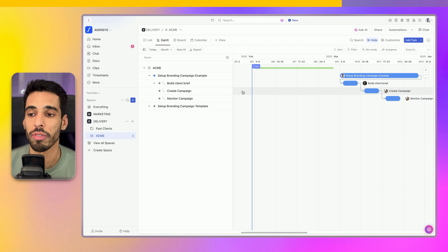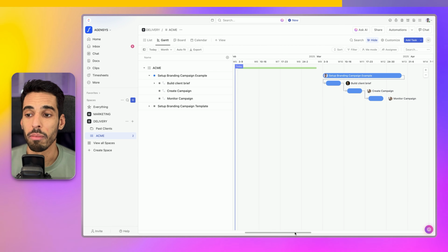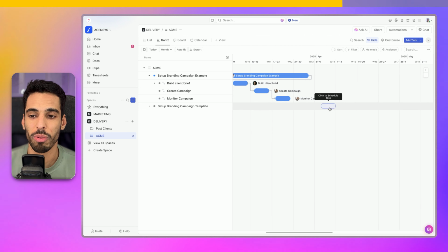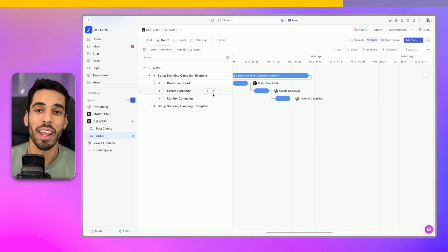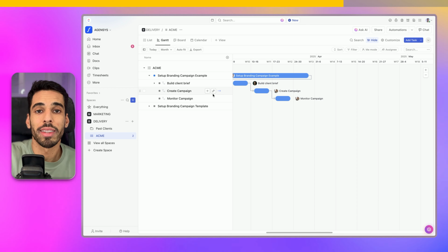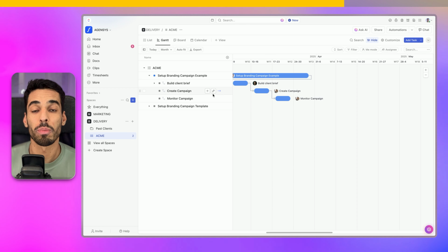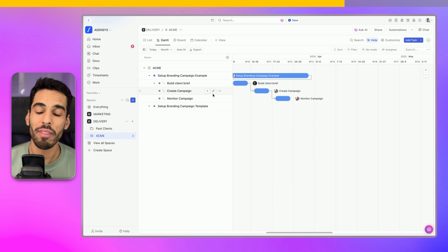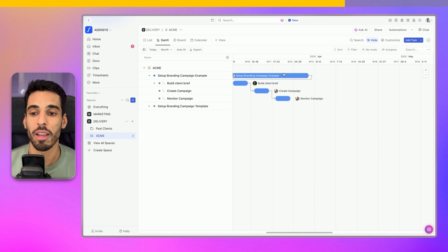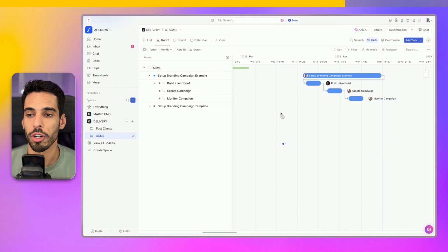It's going to save you a lot of time when it comes to project planning, because it's fairly easy to reschedule 3 tasks manually. But say you had 10, 20, 100 tasks in a project and you templatize that project to reuse later. You don't want to be rescheduling those projects each time. So having dependencies across tasks and subtasks is a very handy feature.